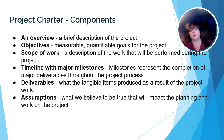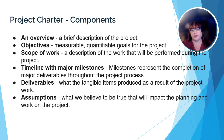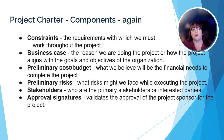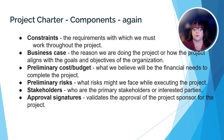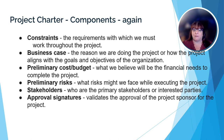Additionally, the project charter will state what the project management team believes will happen on the project. The project charter will list the constraints the project is under, meaning limitations imposed on the project — maybe in terms of money, time, or resources. The business case is included in the project charter as it defines the reason the project is undertaken and how it will align with the goals and objectives of the organization.